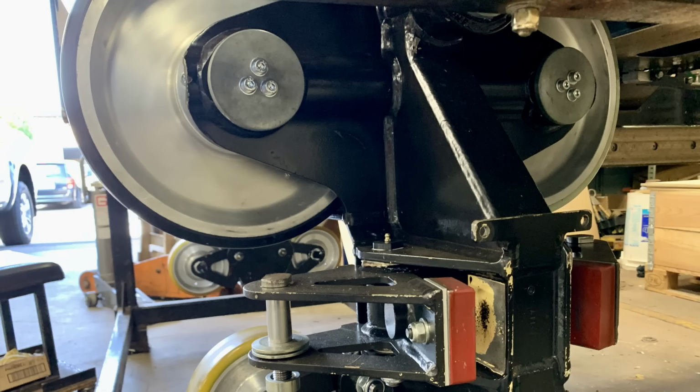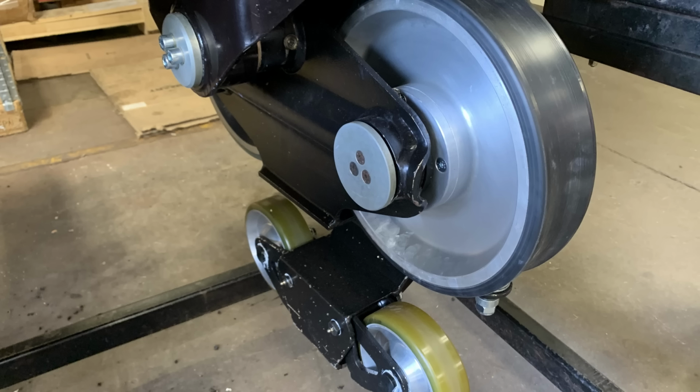That's the pins. So out of there you have wheel carrier pins, pivots, where the upstop and guide wheels go in. Those have pins in them that they pivot on. Those pins have to come out for NDT. The wheels, everything that has a wheel on it has a pin that goes through it. Those pins come out for NDT. The wheel carrier swings on a pivot. That pivot pin has to come out for NDT. Older B&Ms have a big Roth bearing on top. For the floorless models, they've got a big Roth bearing. That bearing has to get NDT'd.